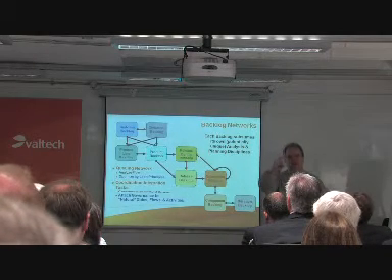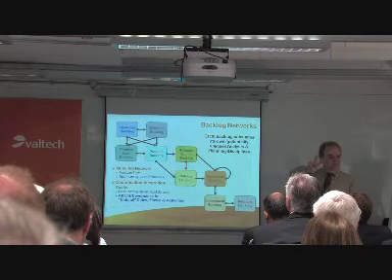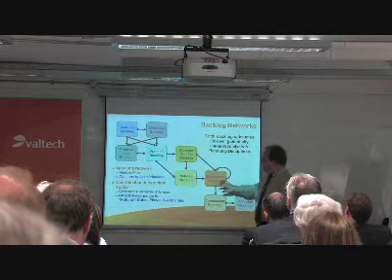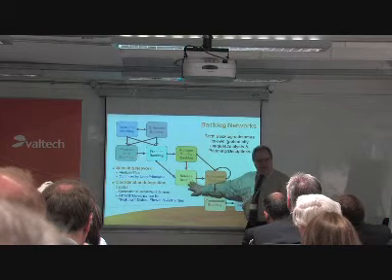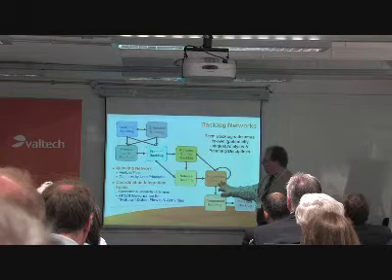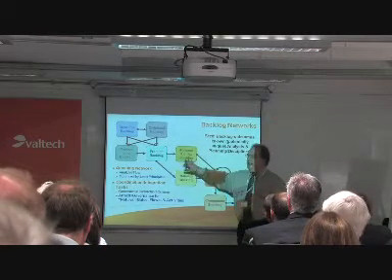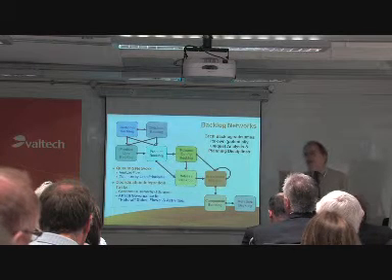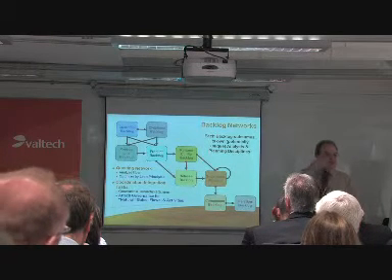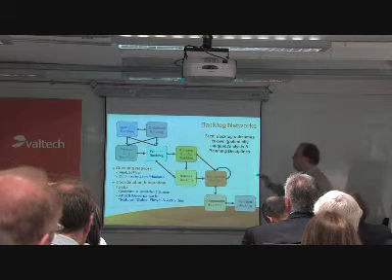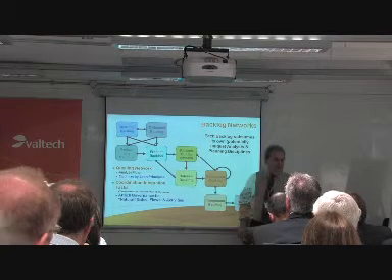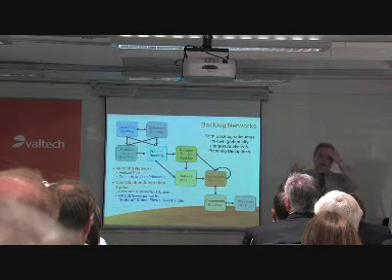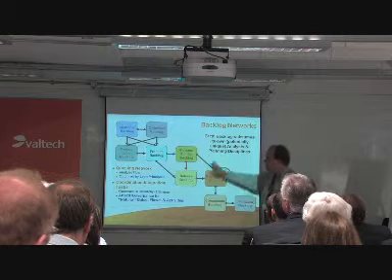Release backlogs contain features and functions, refined one more level down, and they have normal release backlogs, but they also have subsystem backlogs because their systems are so complex that they're doing concurrent engineering on those. But they also have release configuration backlogs because when they release a solution, it's usually an amalgam of about 15 different products in specific configurations, and they can't release any one thing. They have to release all 15. And so there's a release configuration backlog which has a set of stories unto itself, and it flows on down.